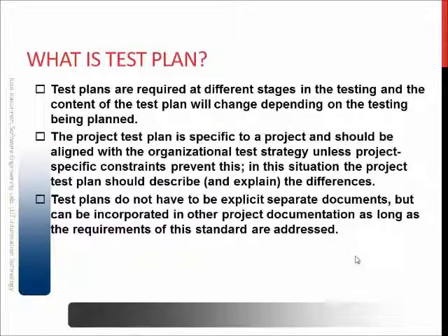The test plan itself is the realization of strategy. The test plan here means the same as test plan everywhere else. It's the list of activities which are used to do the quality assurance, quality control work really. They are project specific. They use the ideas or guidelines from the organizational test specifications saying what phases we have, who does what, the work divisioning, where our test cases are, how we manage weekly meetings, daily meetings, do we have nightly builds, what sort of a use for automation we will have, who will have the final say on releases, for example.